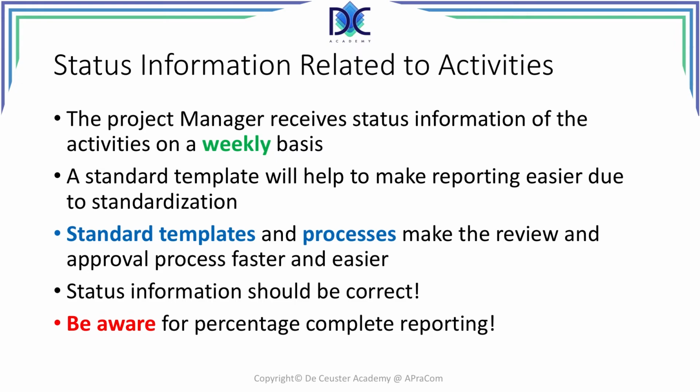When you plan to make 10 bicycles in a period of 4 days, or 4 periods in general, you should have finished 5 bicycles to report 50% complete. So when you see an activity and the team members report 50% complete, you have to verify how many bicycles the team created.